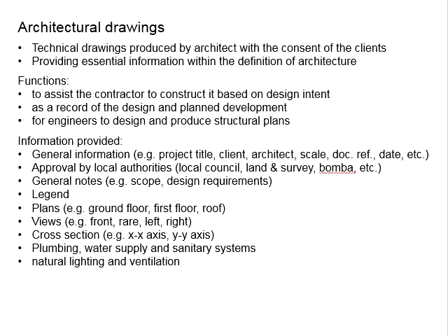Next, after the structural design by the engineers, a structural drawing will be produced, and both the architectural drawing and the structural drawing will be forwarded to the quantity surveyor, known as the QS, for the bill of quantities and costing purposes.